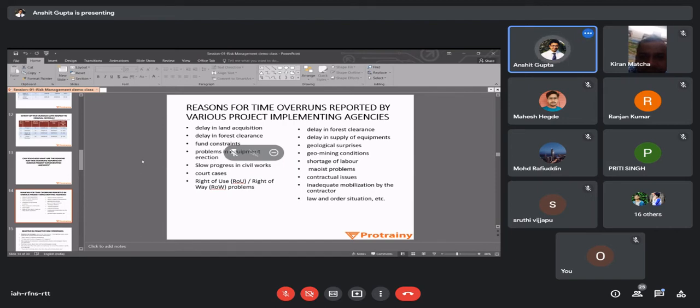And there are two ways of risk management. I, as a planner, for example, was the person who used to prepare the risk register at my site. Then I used to discuss that risk register with my project manager, and my project manager used to suggest corrections, and then we used to highlight that risk register to the client and to our company's senior management. But preparing a risk register is not an issue. The actual issue is whether your management is able to solve the problem, and whether your management is acting upon what you are trying to highlight.